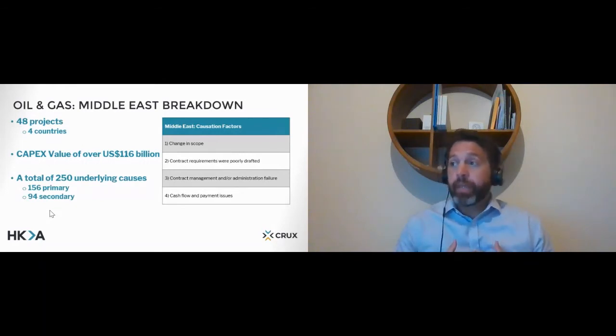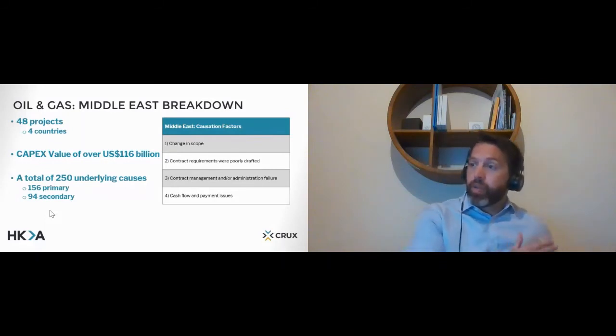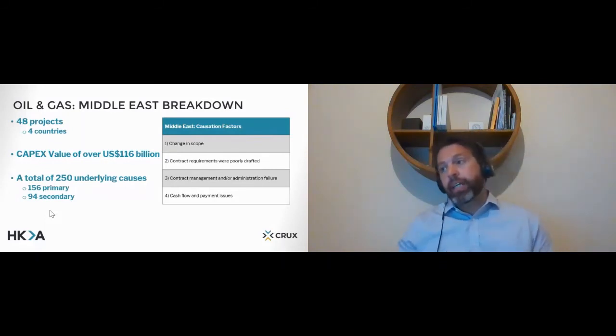Again, in my opinion, one of the ways to do this, and what we've done with different organizations, and it can be on the operator's side of the table, it can be on the contractor's side of the table, is do wargaming at the start. So we would come in, set out certain scenarios with the team. They would go away, have a look at what they think, how the contract would work, come back, discuss it. And at least you're testing the team on certain scenarios coming up, and they understand how the mechanism works and understand how the contract works.